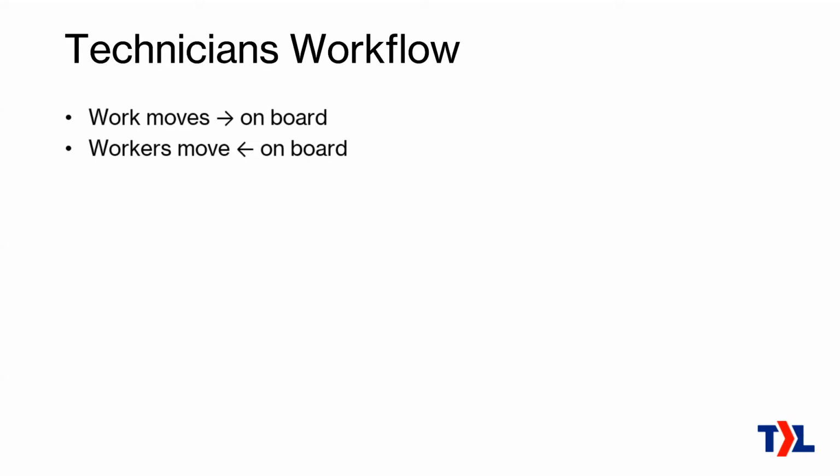So that's one of the many reasons we don't want a whole lot of half-finished work. We want a small amount of work that gets done very quickly, because we can only tell the customer, hey, we've helped you, here's the solution to your problem, when it's totally complete. So we want to start working on the stuff that's closest to being complete, on the right side of the board, hence starting on the right and working towards the left.